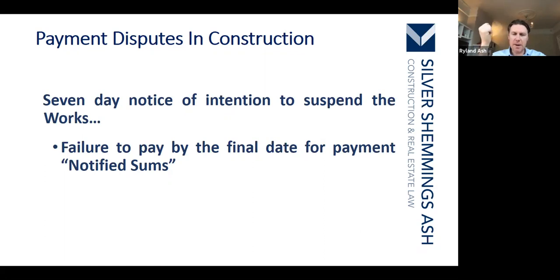It has to be paid, and then an argument could come out later, which I'll come back to in a moment. And you then have the right to issue this notice of an intention to suspend the works, and you can suspend all or part of the works, and you can also seek to recover your loss and expense. So that's your leverage in the first instance if you haven't been paid, if it's a notified sum.